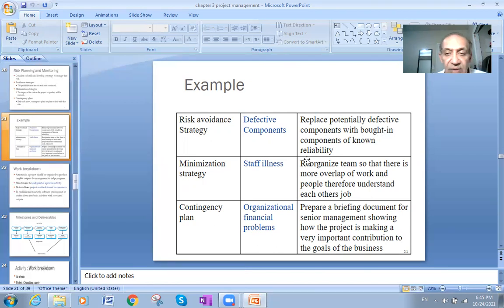With others, I don't know, maybe the risk will increase and he might deliver defective materials or whatever. So in that case, I use risk avoidance. I will say, I don't want this supplier. I need another supplier who will give me my raw materials, and at the same time I will be quite sure, because I trust this guy and I worked with him many times before, and I know that he will never cheat me.